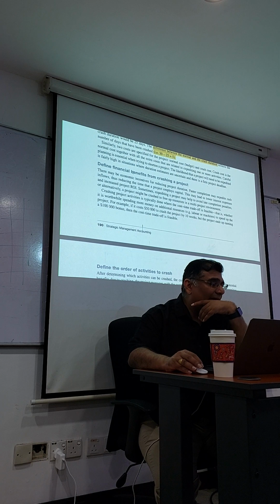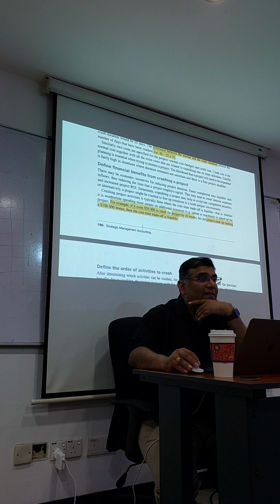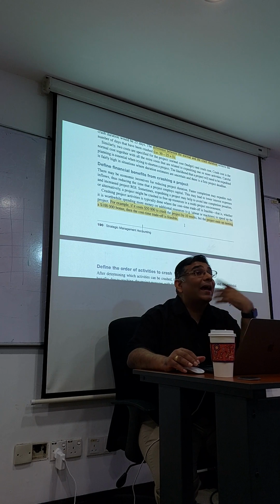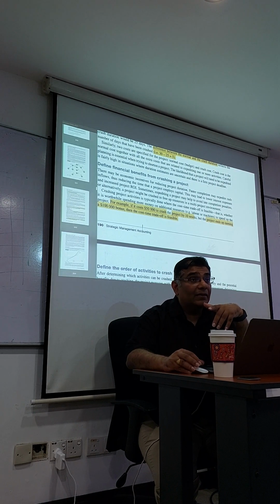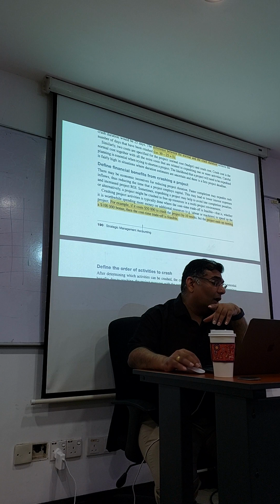Then, define financial benefit from crashing. So here, you do need to know. For example, cost is 50,000 to crash the project by 10 weeks. But the project ends up earning a 100,000 bonus. Then it is worth it to crash, right? That's all that you see, what you get versus what you spend. Do you need to crash or not?